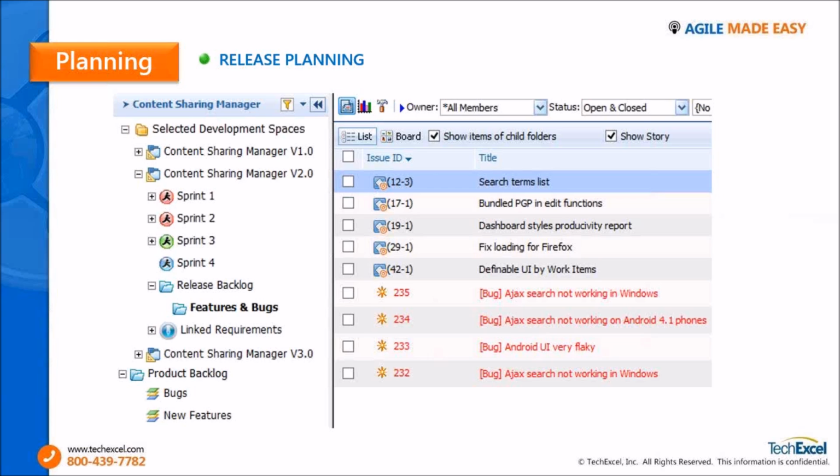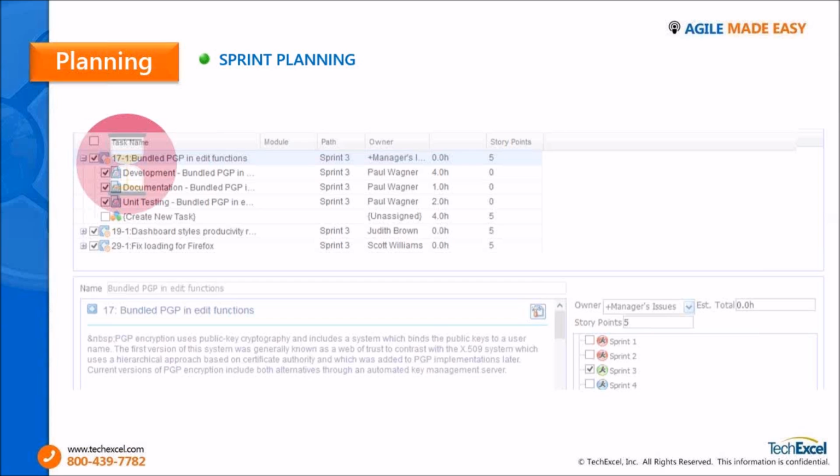So the first thing is that before every release, I believe 2 weeks before the release starts, we have a release planning meeting wherein we start populating the release backlog. And as I mentioned earlier, this release backlog is populated using the product backlog. When we are having this release planning, we take this opportunity to actually roadmap the user stories for each specific release, so that we can quickly prioritize the user stories for each of the releases.